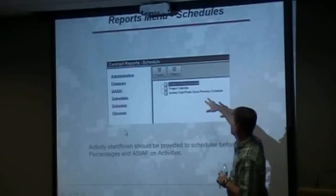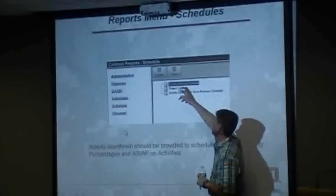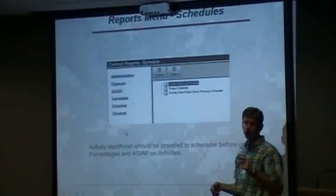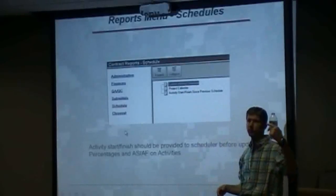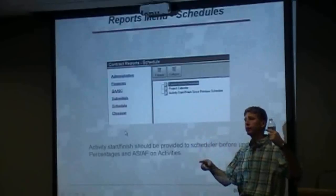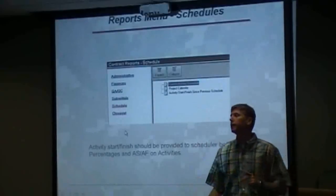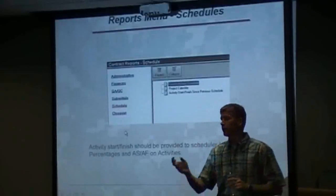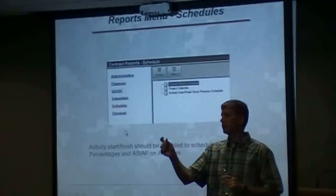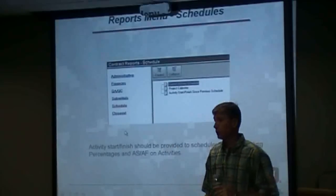The next one here is the scheduled one — current activity schedule, project calendar. The project calendar is a really pretty cool calendar. It starts at day zero and you can look down the line, and then any day of the contract it will tell you what calendar day of your contract you're on.